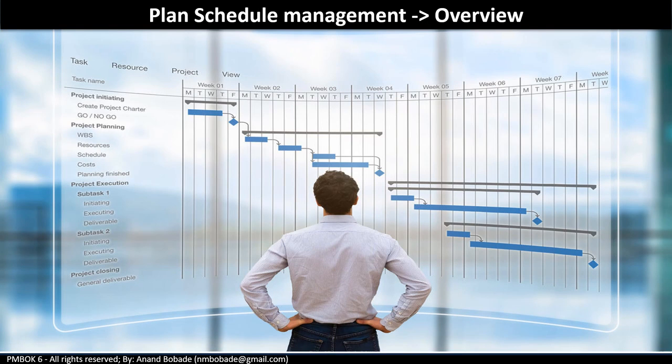So why this process? Why not directly create the schedule? How many times have you created the project schedule on your own, presented it to the business and got the approval? But once you start executing the project, the team responsible says this is not a realistic schedule at all and they don't agree to it. With the management pressure, you may force that schedule on your team, but then the team gets demotivated. Or you may get into schedule replanning, which is just a waste of time.